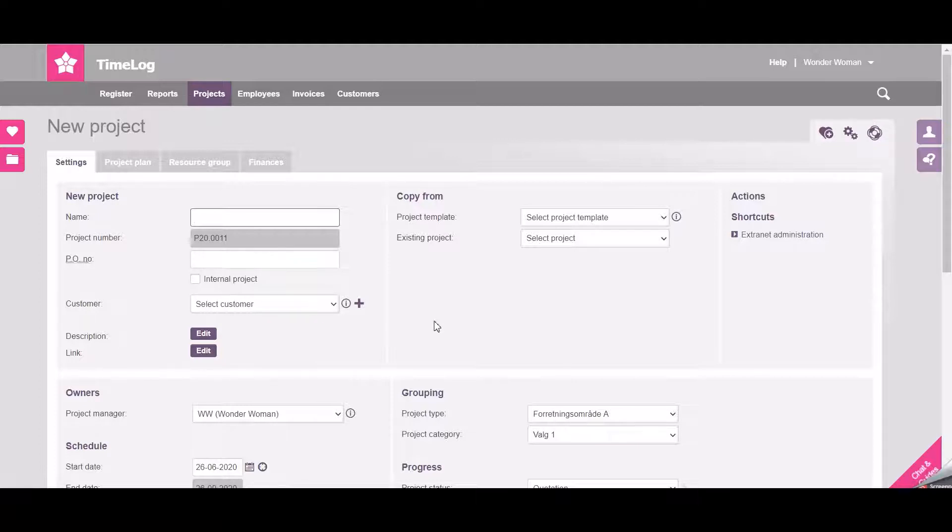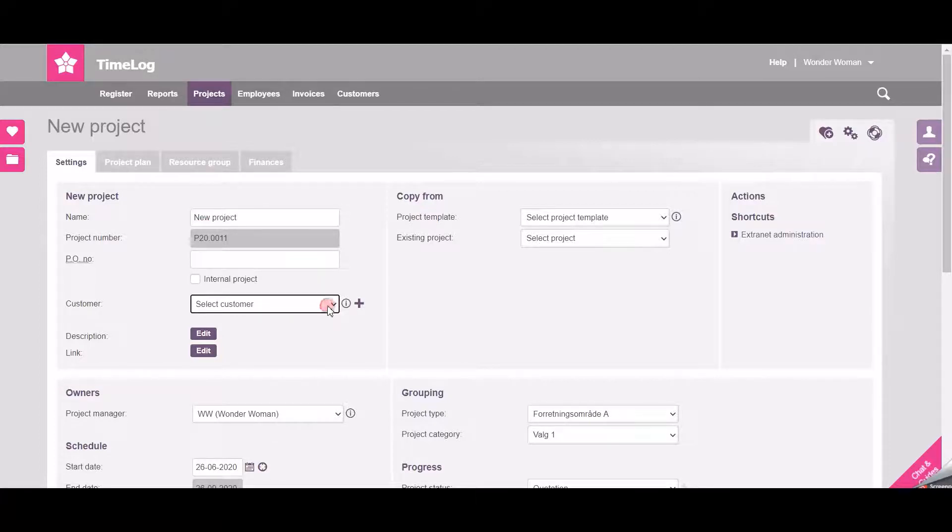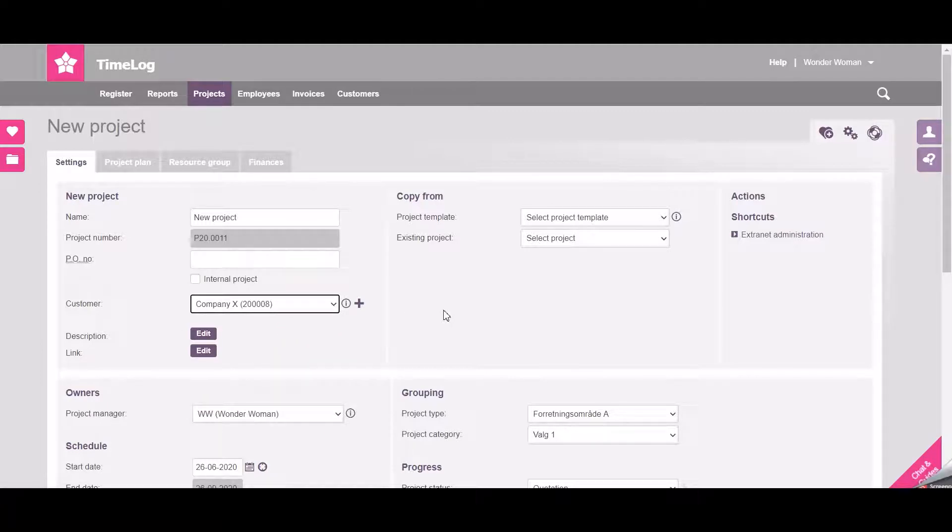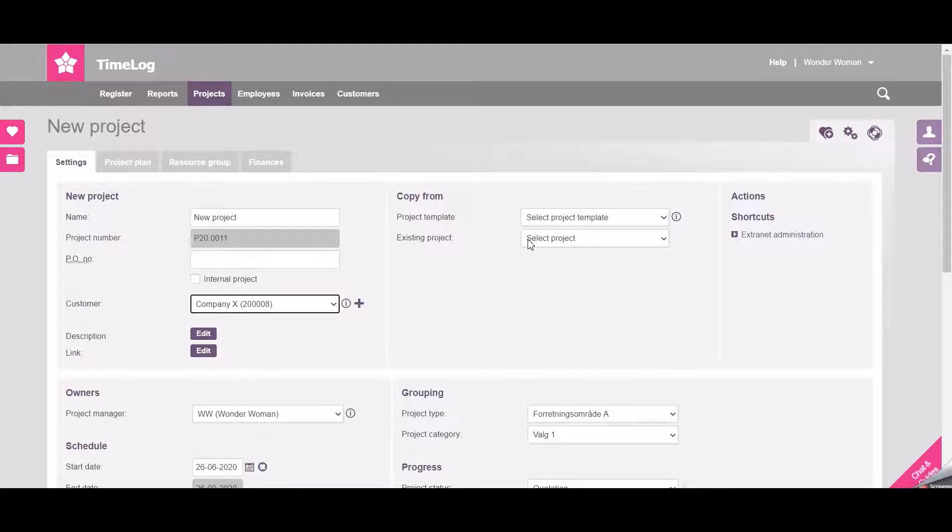We start by selecting a name for the project, which customer this project should belong to, and over here I can actually choose if I want the project to be created from a project template or from an existing project.